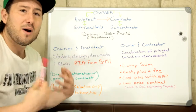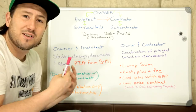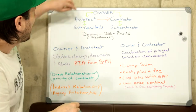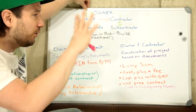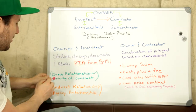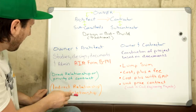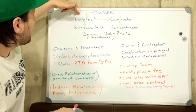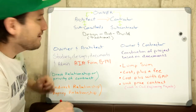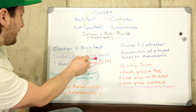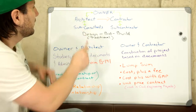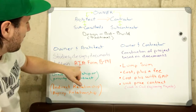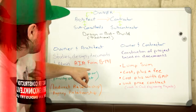We have an owner who has an idea — who needs something built. They have a need, usually a facility that will help them make more profit in their field of business. There are two types of relationships in this whole arrangement: one is the direct relationships — privity of contract — and the other is the indirect, agency-type relationships. The owner will enter into an agreement with the architect to design the building, do studies, and produce the construction documents.